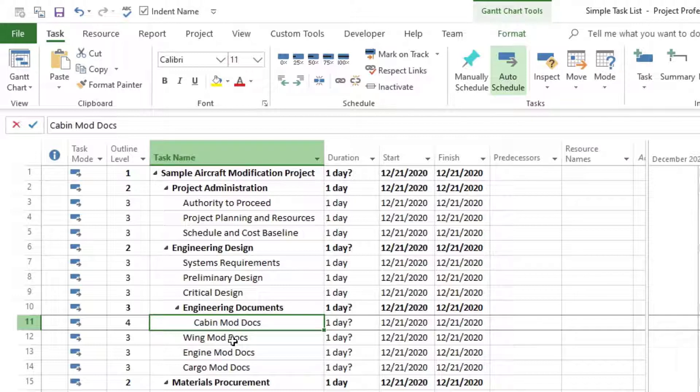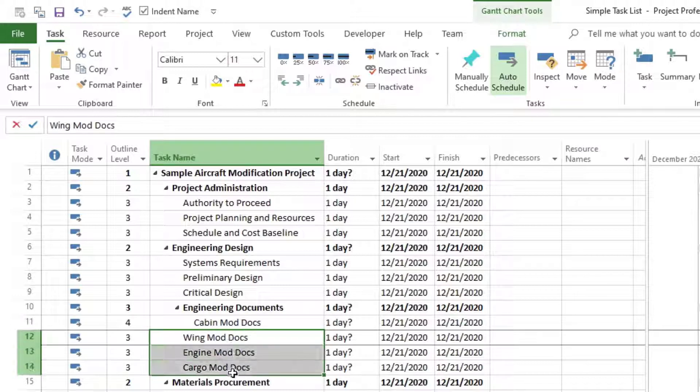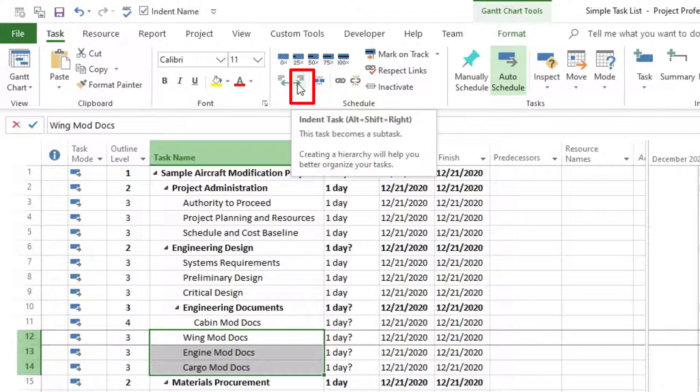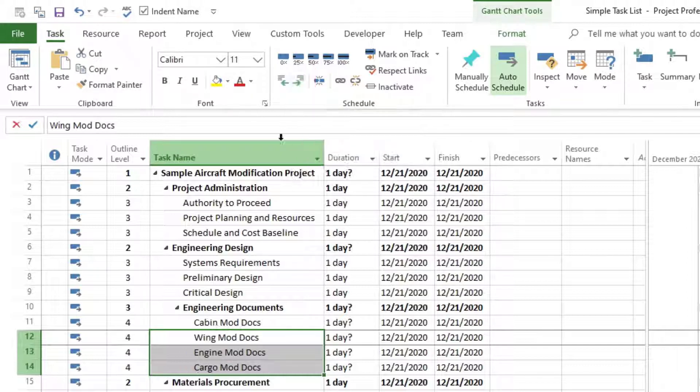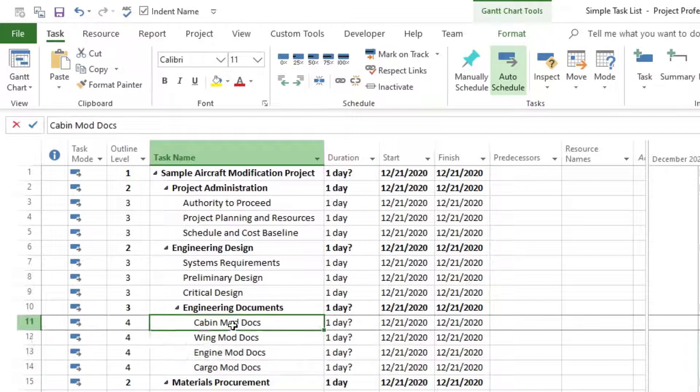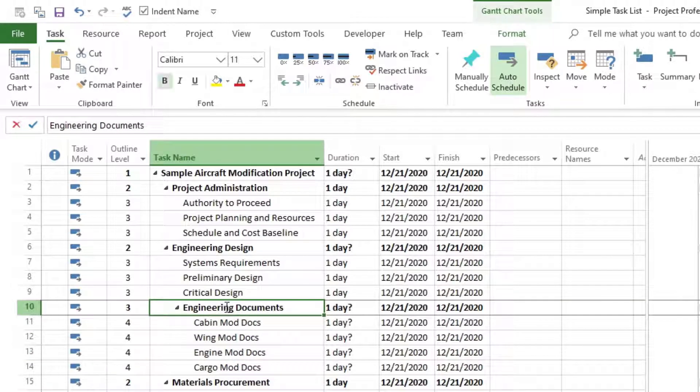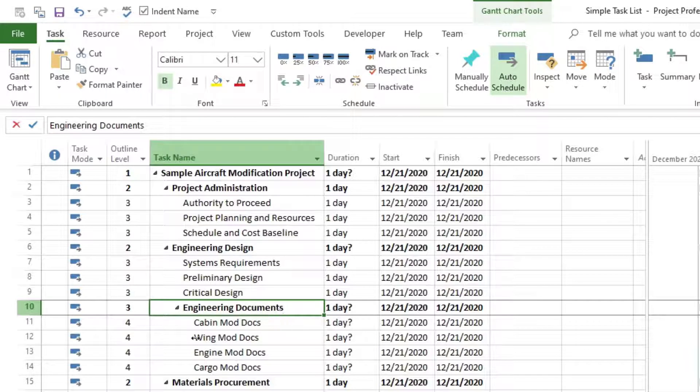If we want to indent all of them under there, all these other tasks in there, we can easily highlight all of them and then go ahead and go to the tab task and then hit the indent task button. So click on it. And now we have all of these tasks right under our major task or summary task engineering documents.